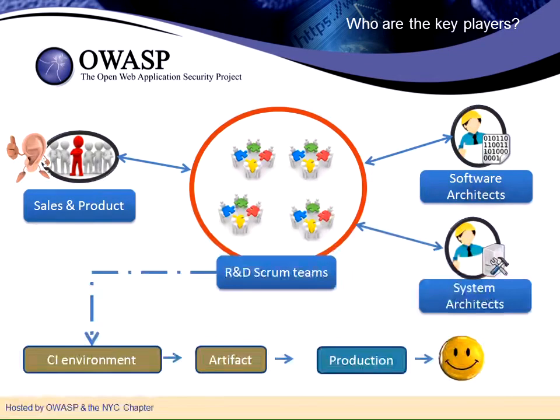Sometimes the user stories are easy to understand, and we can match the user story directly to the relevant Scrum teams, but sometimes the user stories are more complicated, and we need first to understand and find out which relevant Scrum teams it needs to fall into. So to do so, we have the software architect and the system architect to support the product, to identify and break the user story into small chunks and create a new user story for each Scrum.